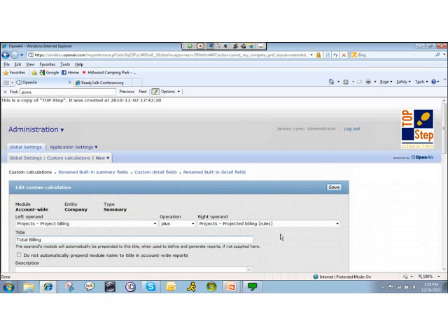Anything from December 1st forward will have a value in projected billing, but theoretically should have nothing in actuals because you have not done month-end close yet. So therefore, you can add the two together and get a total forecast for the year. The challenge becomes, for many of you, the last week of any month, where you start running billing, so you start getting actuals in the system. And because you start getting actuals in the system, the actuals are adding again to the forecast, so you're double counting. So this is where the timing things happen.